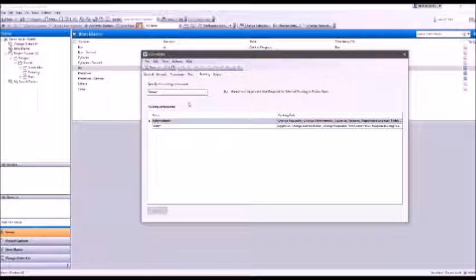You can set up your routing list. If it's a simple spelling mistake, I can create it, I can approve it, I can make the change. If it's a business critical £1 million change to that design that's going to affect everything we ever do, everybody in the business is going to be on this routing list. Because I want to do it. The management says, yes, it's good. Finance says, yes, we can afford it. Managing director says, yes, we can get it out in time. So different routing lists basically say who can do it, can it be done, who can authorise it, and who can pass it through the system.